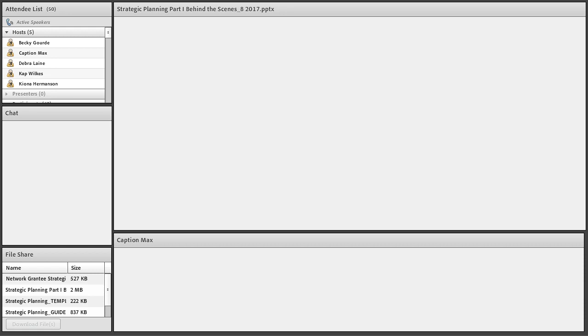And then when will you provide that information? Ad hoc, monthly, quarterly, in person, only as requested? And finally, who is responsible for the communication, for its accuracy, timeliness, and frequency. Here's a sample of a template that could be used to develop a communication plan. This is what you're going to be finding as an example in your strategic plan toolkit.